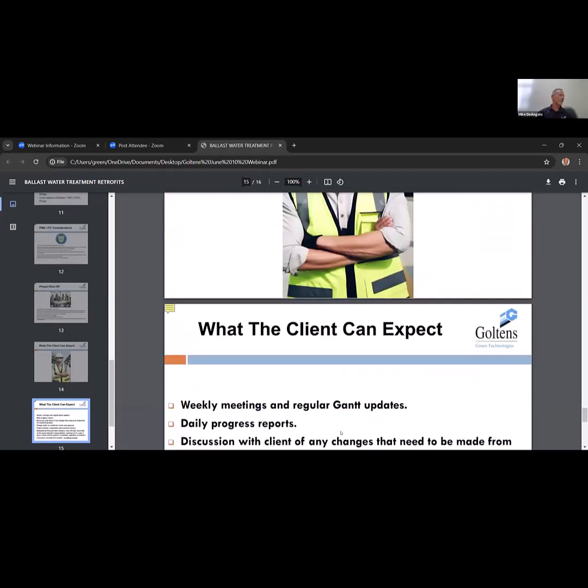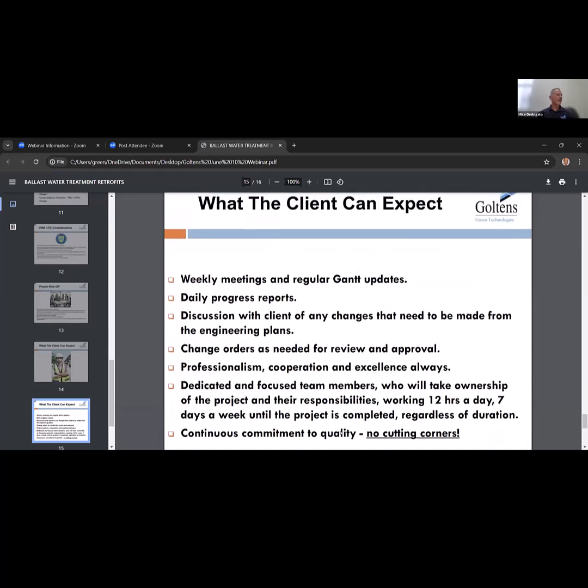What the client can expect: weekly meetings and regular Gantt updates, daily progress reports, discussion with the client of any changes that need to be made from the engineering plans, change orders as needed, professionalism, cooperation, and excellence always. Dedicated and focused team members. We work 12 hours a day, 7 days a week until the project is completed, and a continuous commitment to quality, no cutting corners. All right, that's the last slide.